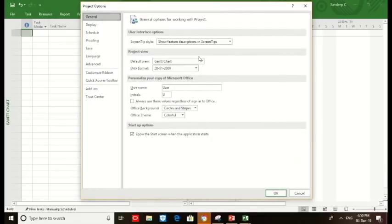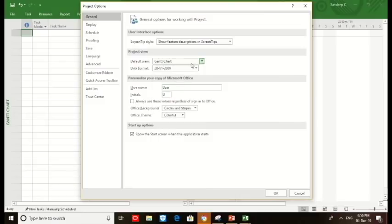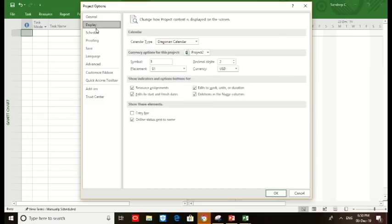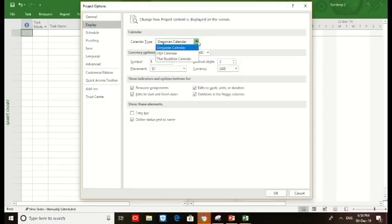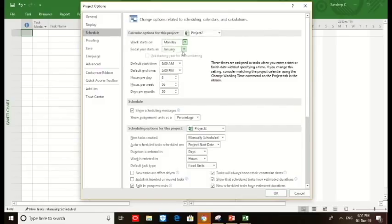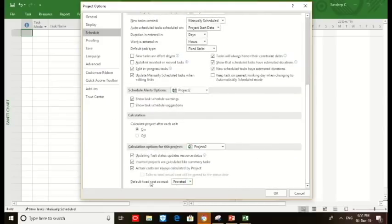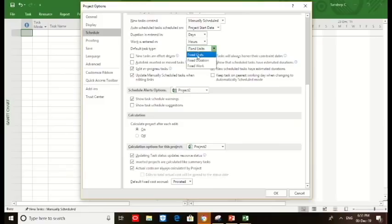We must check what options are preset in your project. Go to the project options, check general options, what view you want with Gantt chart and timeline or just Gantt chart. I just click the Gantt chart. I choose the date format and display USD and Georgian calendar. We must select the Georgian calendar. Schedule options: we select the week starts on Monday, fiscal year starts in January, and all the default start time and end time of the project, hours per day, hours per week, days per month, percentage schedule, percentage options.